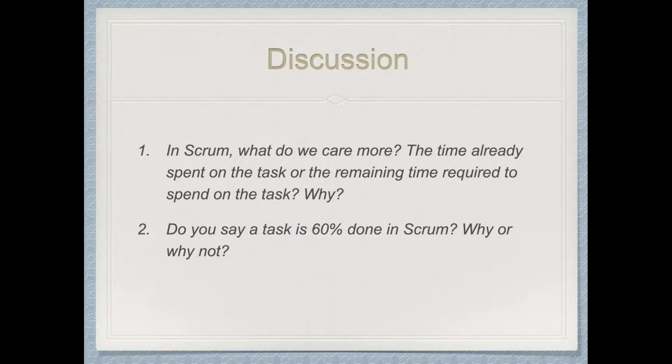We would say for a task how many person hours or how many person days, or later in this class we will say how many story points we need to complete a task. So we don't say what percentage we have completed, because if you say you are 50% done, or 20% done, or 60% done, your customers don't know how much time you need.